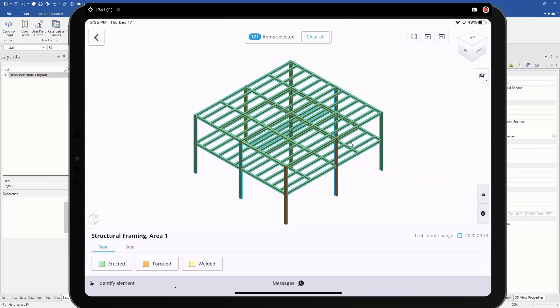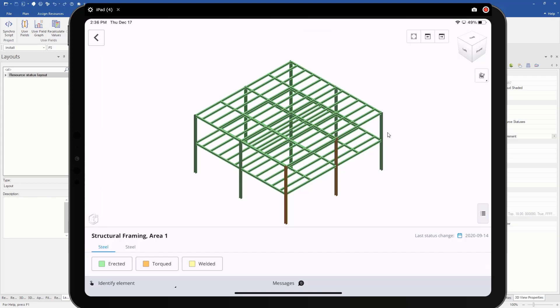So now let's say we got a few more torqued today. I can go and then go clear all, and I can go and select the two, maybe three that we got torqued. I'm going to add it as torqued.